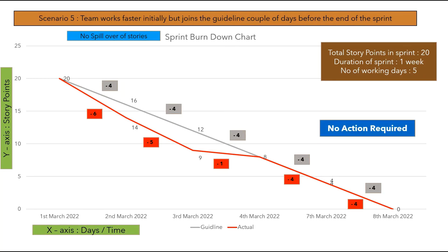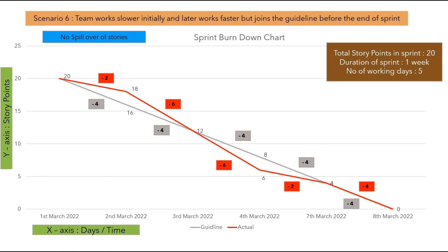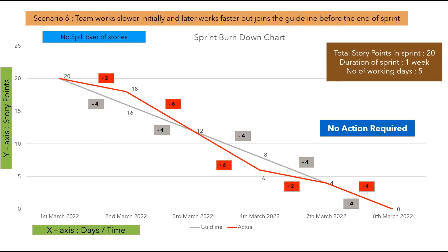In another scenario, the team works slower initially and then faster. On the first two days, the actual line is above the guideline, meaning the team is working slower. On days 3 and 4, the actual line is below the guideline, meaning the team is working faster. By the end of day 4, the team joins the guideline, and on the last day they burn down 4 story points, completing all 20. No action is required in this scenario.